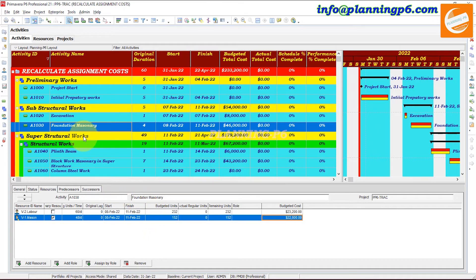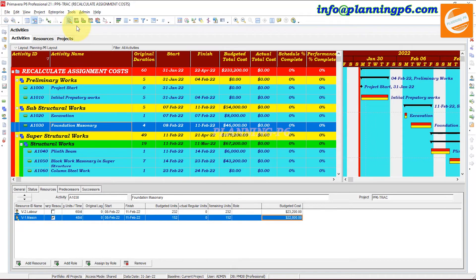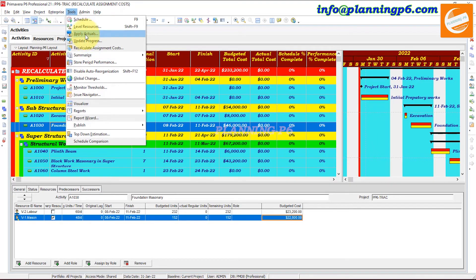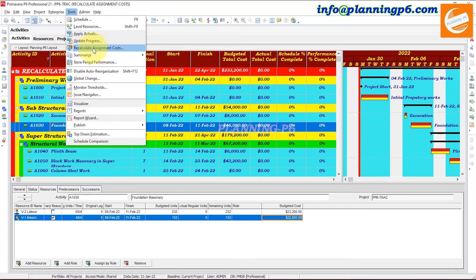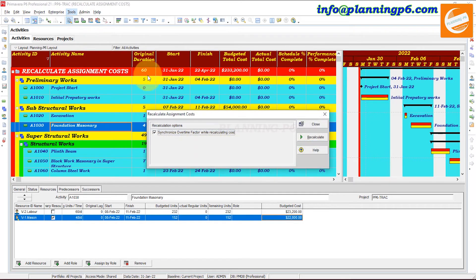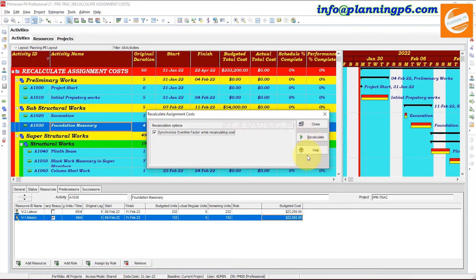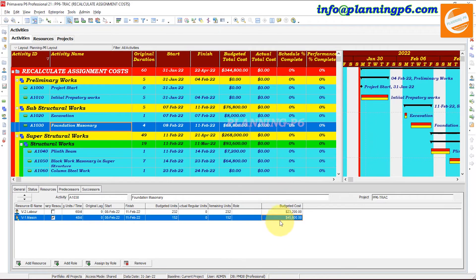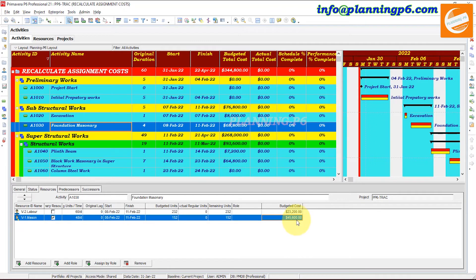This one is our budgeted cost for the mason and these are the budgeted units. So we changed the budget cost for this mason. This option is located here in the tools and the recalculate the assignment cost. Click on it. Yes, I want to recalculate. Just focus here and here. You can see now you have changed the mason cost. It has been changed here and it is also affected your budgeted total cost.